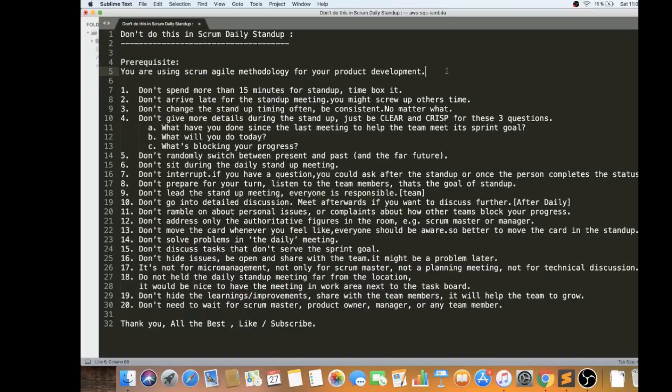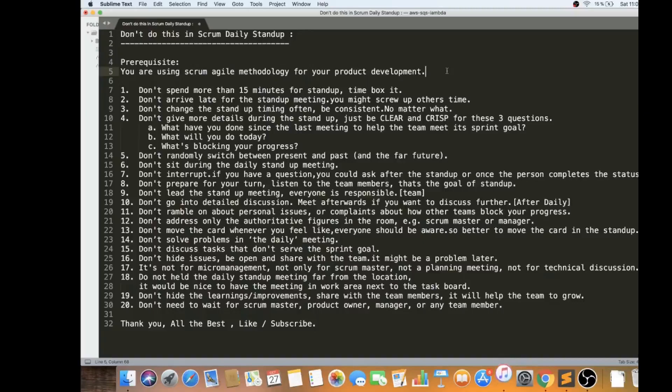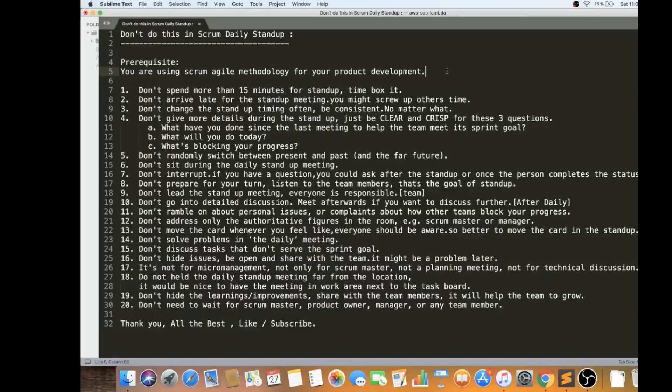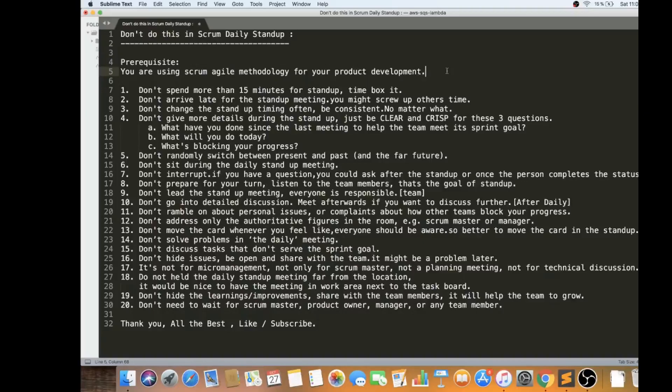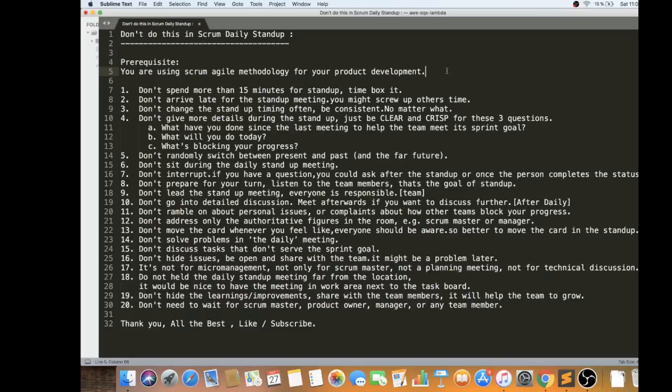Also I would say please have the same time. Don't change the standup timing often. If you want to have the daily standup at 9 o'clock, be consistent no matter what. If you want to have 10 o'clock or 11 o'clock, please discuss with the team. If any one of the team members is not comfortable, then change in the next retro and try out with a different time, but don't change often.